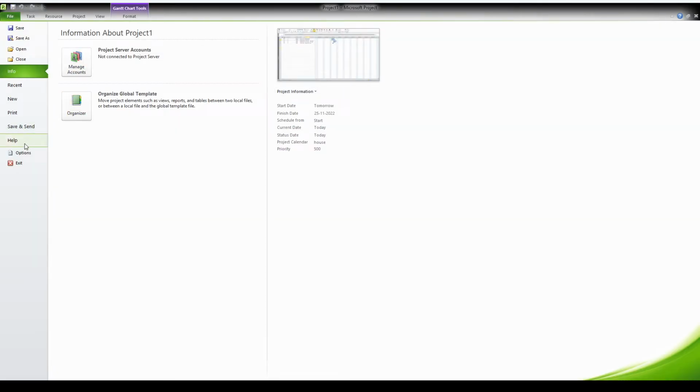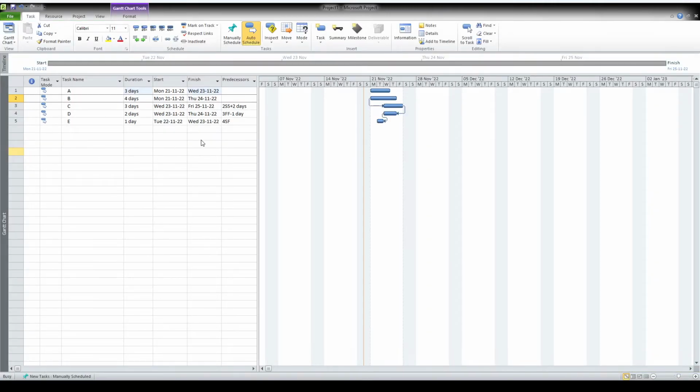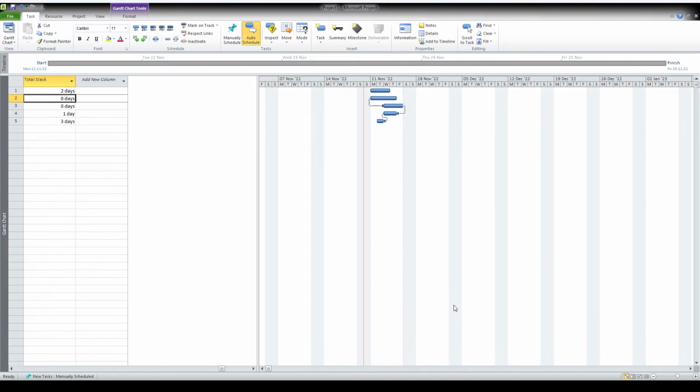Here also in Options I go to Schedule. Here hours per day is 8 hours, per week 6 days, so 48 hours. I click OK. This you can also set up before the start of the programming. Now we will go into the real time model project, and we will see how it has been done.